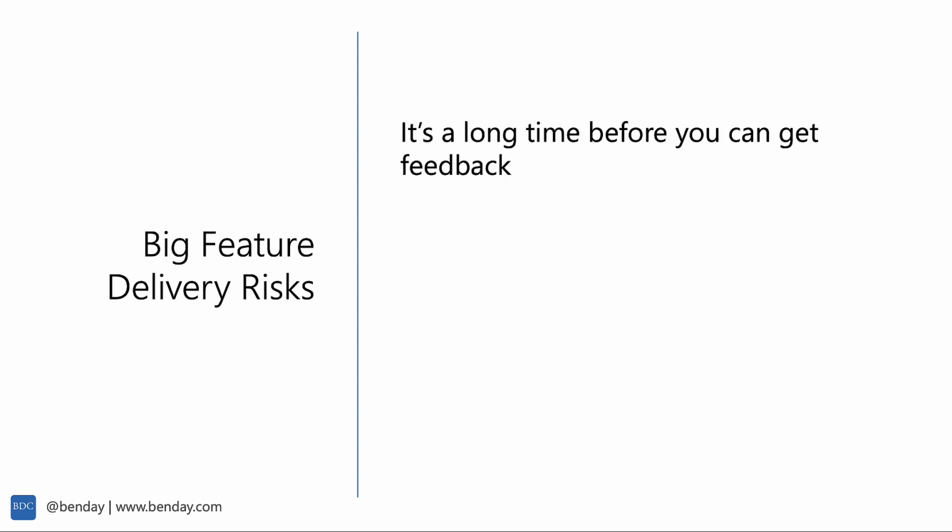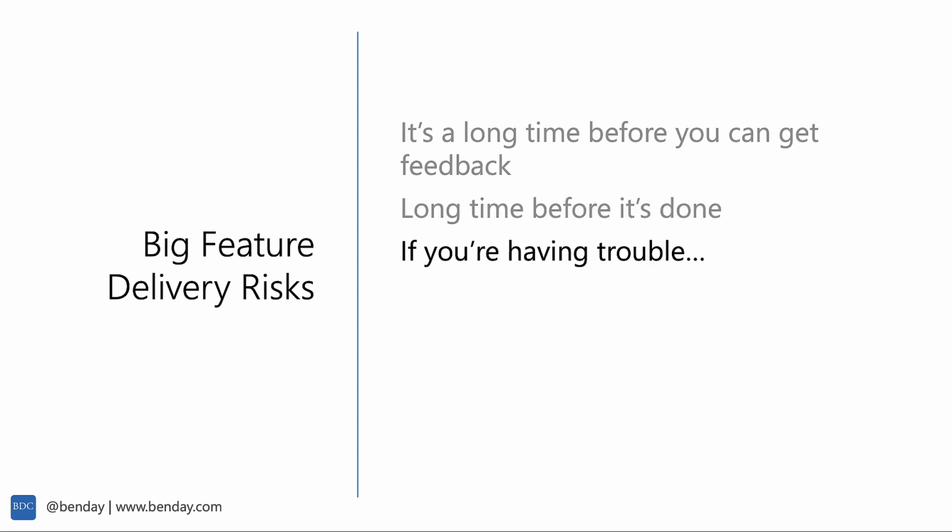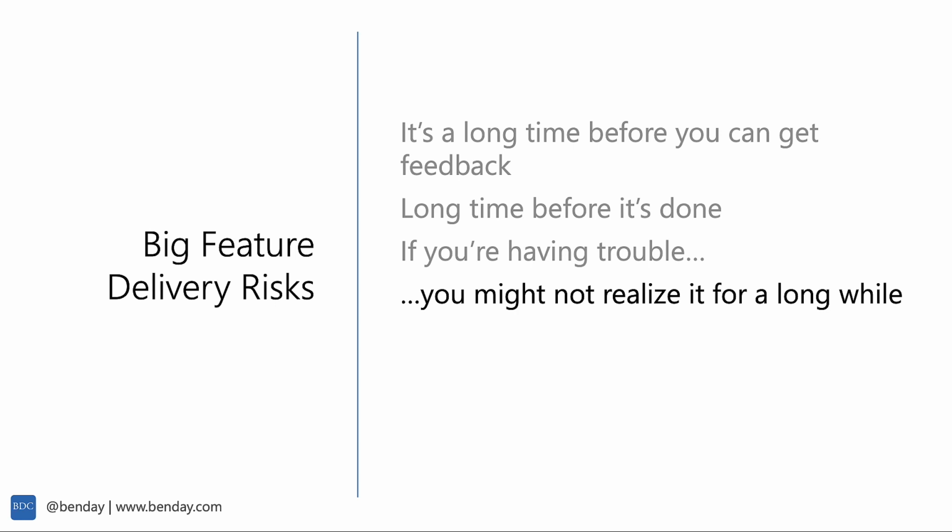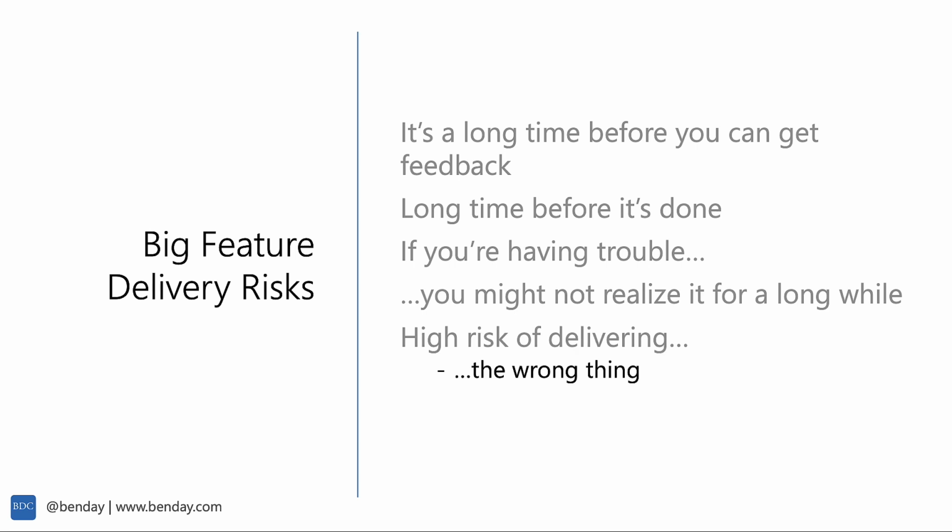One, I want to make sure that I get good feedback quickly, and it's going to be a long time before you have something that's feedbackable, something you can show off and get some meaningful feedback on. It's also going to take an awfully long time from start to finish before that thing is done. And if you're having trouble delivering that gigantic 30 to 40 day feature, you might not realize that you're having trouble for a really long time. And there's a high risk of delivering the wrong thing or delivering nothing. Not to mention it's probably not a whole lot of fun to try to deliver a 30 to 40 day feature all in one go.